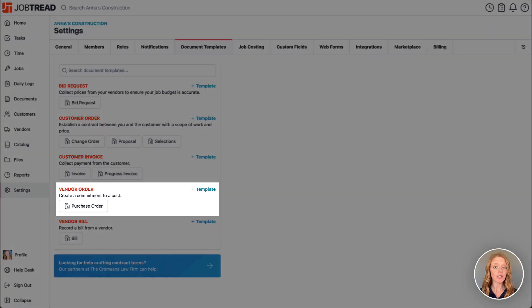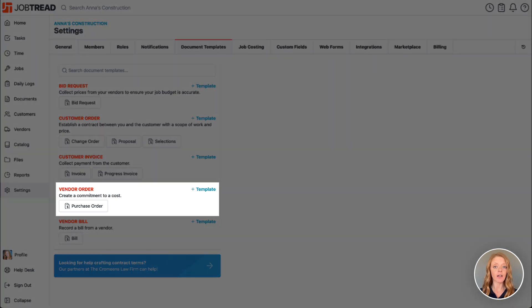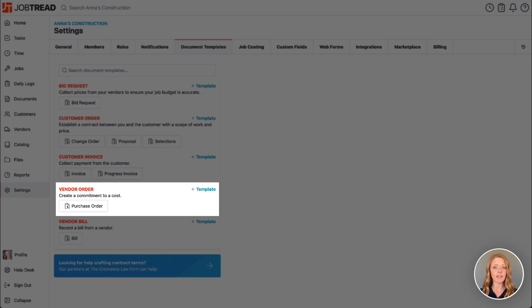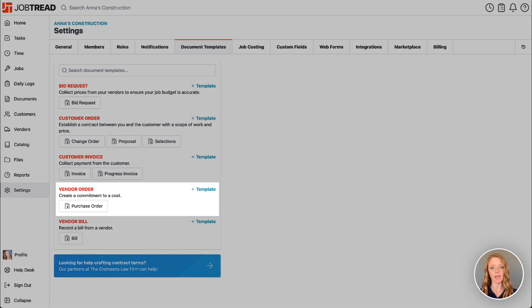Vendor orders are used to log committed costs that you are not quite spending yet, so essentially stating that we intend to pay this amount to a specific vendor but at a later time.